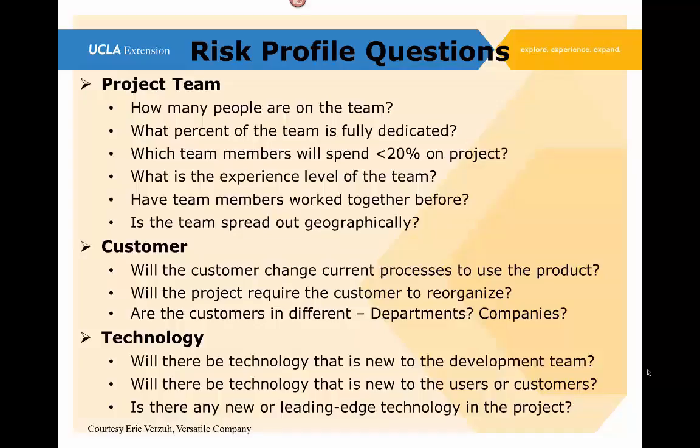I also go through learning curves and what I call spooling up curves, getting back to where I knew what I was doing yesterday. And that happens 5 times a week for 4 hours if you're getting somebody half time. What I'd rather do is, if I'm going to have a person half time, I'd rather have them for 2.5 days, either from Monday morning to Wednesday noon or Wednesday noon through Friday evening. That way, there's a continuity in the work that's being done. That means there's more productivity, better efficiency.